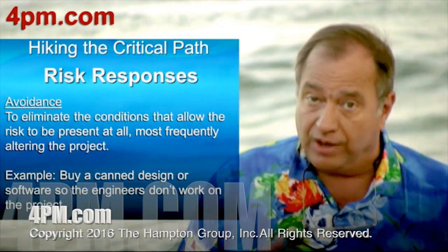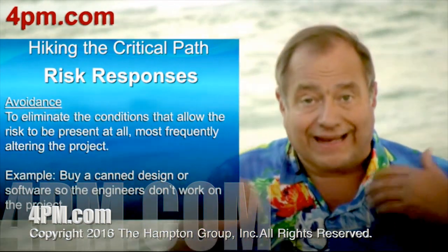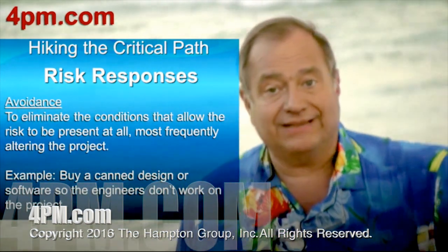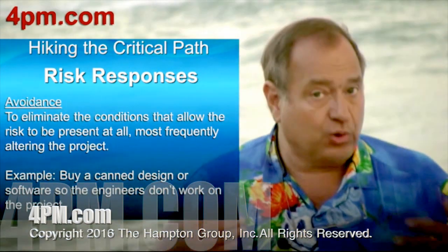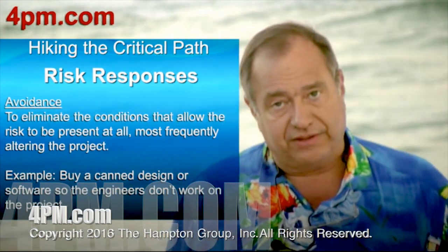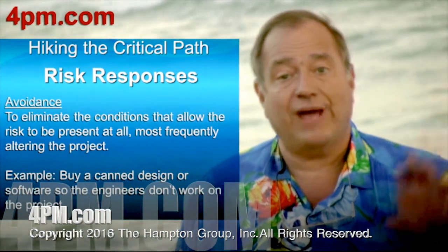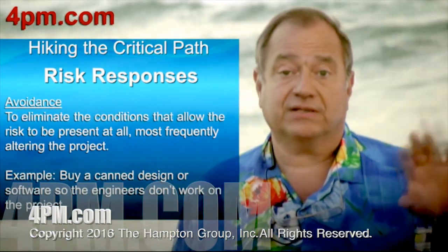Now, there may be some costs and consequences. Buying it from an outside vendor, buying a canned software product or a canned design may not be quite as good as what the engineers could have done. So we have those trade-offs here. But avoidance is one possible strategy for this risk of turnover among our engineers.